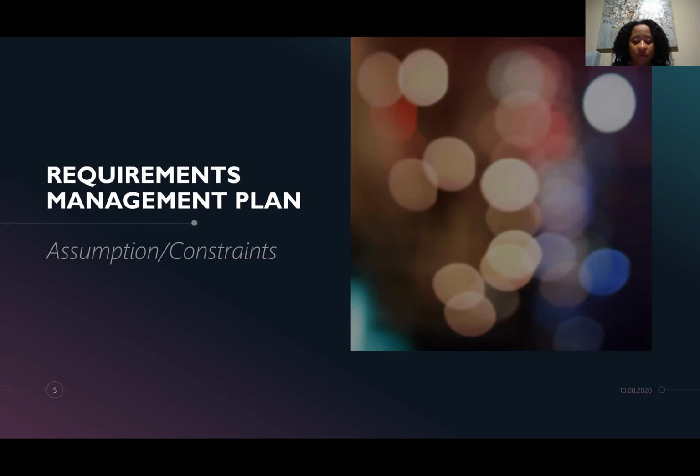Constraints include a budget of $8 million, time frame of 3 years, estimated 3-year savings of $33 million, 3 years to train area care providers in use of systems and technology, and the creation of approximately 23 jobs for practice consultants, health information analysts, health education specialists, and lean practice redesign specialists. Multiple functionalities include data exchange system between primary care and imaging facilities, reduction in cost without loss in diagnostic accuracy, reduction of cost without restrictions on test ordering, and reduction in unnecessary imaging for beneficiaries in southeastern Michigan.